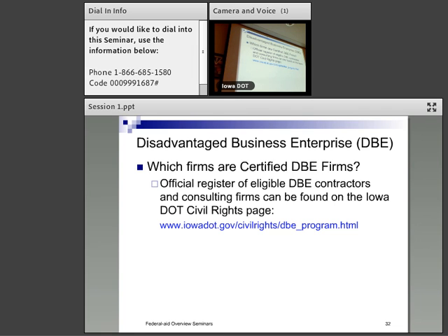So when I was talking to the prime, I said, what were we supposed to do? You were going to require us to go and find another DBE for this one day of work. I'm like, well, no. What we do is we take a look at what your circumstances are on the ground at that point in time. If you had explained to us this was the last day, DBE was not able to show up on the site, would we have called the DBE and said, is this the case? And verified with them? Yeah, we would have. So one more phone call, we would have verified it. Everything is fine. We would have documented it contemporaneously, and everybody could have moved on, and there would not have been that price adjustment.